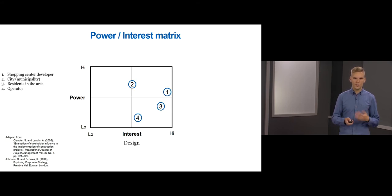In the design phase, the shopping center developer is very interested in the project and has high power to influence decisions about designing the shopping center. However, the municipality has higher power to influence decisions due to the legal city planning procedure that influences the shopping center designs, such as building height.